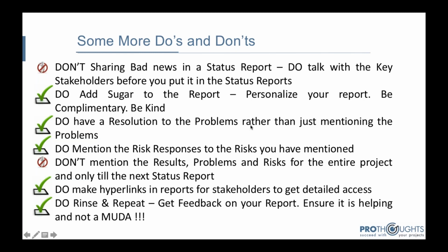The other thing, now with the technology, one of the good things is that some people would love to get into details, and I think you as a project manager should have the detailed information with you in case some people ask you. A good thing is to provide hyperlinks, because it's software, and people can get access to the details, be it through your shared folders or your project management tools. Put hyperlinks for people to understand the reports in detail. On a second page, I generally add reports like the variance reports or the earned value reports, and I provide hyperlinks to my tool, where they can get into more detail and understand.